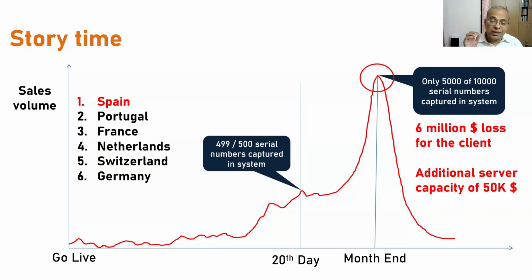So now what do we do? The entire project got rescheduled by 6 months. And we were about 250 consultants working on this project. So imagine the additional cost the client had to bear because of this extension of the project, which was not planned. And then when we realized where did I go wrong, because I was the BA for this project, I forgot to mention the scalability requirements.